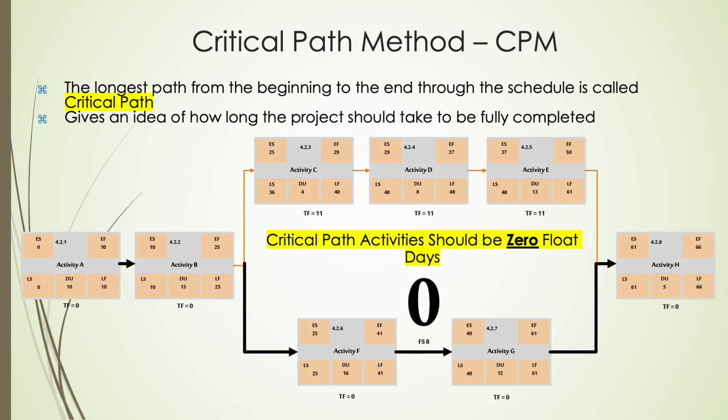In the network diagram shown, project activities are mapped with their early start, early finish, late start, late finish, and duration values. Activities A, B, C, D, E, and H follow a sequential path with minimal float, suggesting this is the critical path, where delays directly impact the project completion date. Other activities like F and G, although connected to the network, possess flexibility due to their differing LS and ES values, indicating available float. This visual breakdown helps clearly identify where tight scheduling control is needed.